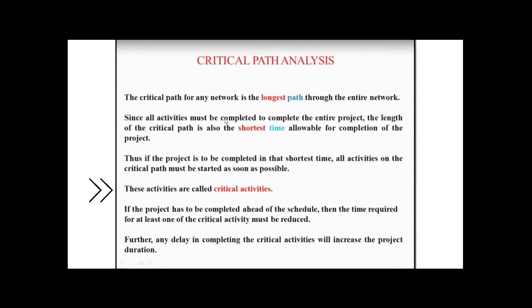Again, if you want to reduce the duration of your project, you must reduce at least one of the critical path activities. And if you also want to delay the project, you increase the duration of these critical activities.